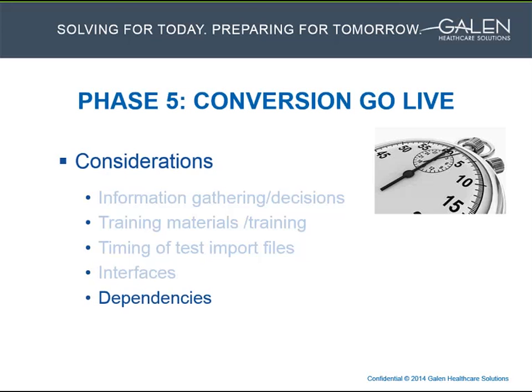So just to reiterate on the slide here, from the beginning of the project time, the analyst or person acting as the PM will collect and keep track of all of these open issues, including the things to remember and address during the go-live planning. I find that one easy way to do this is right on the weekly status call agenda. Every week we're getting together, we're looking at the agenda. Why not keep everything in one central place and even review on a pretty frequent basis as that list is growing, to make sure that we're giving it the due time and process that you certainly will need to with some of these issues.